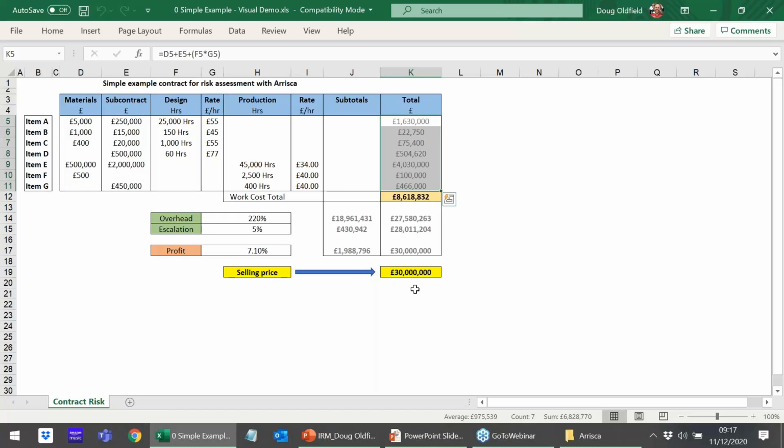To my mind, sensitivity analysis is really about doing a couple of things to a model. The first part is about changing inputs, collecting the results, and then seeing how those changes impact upon the project cost or whatever your key metric is. Of course, that's something that you can do manually if you've got the time, inclination, and thoroughness.